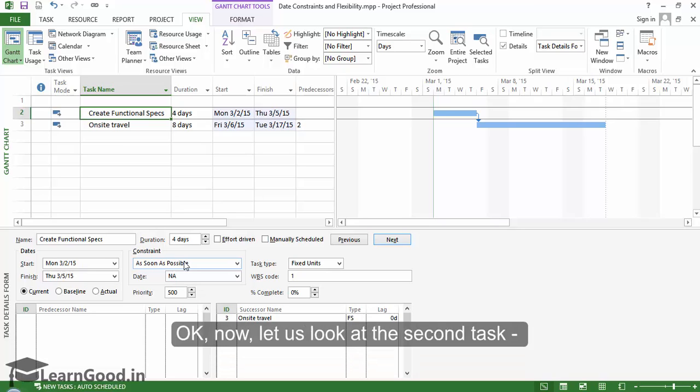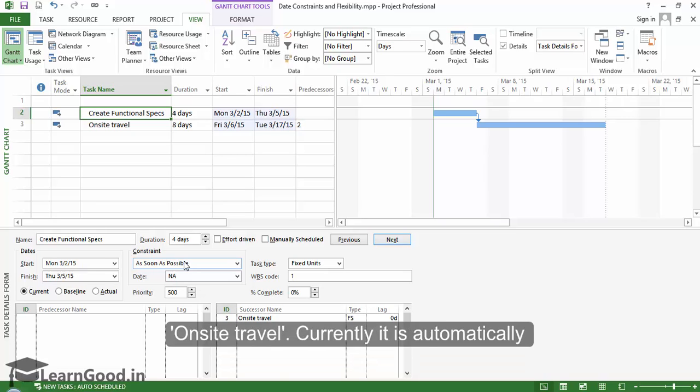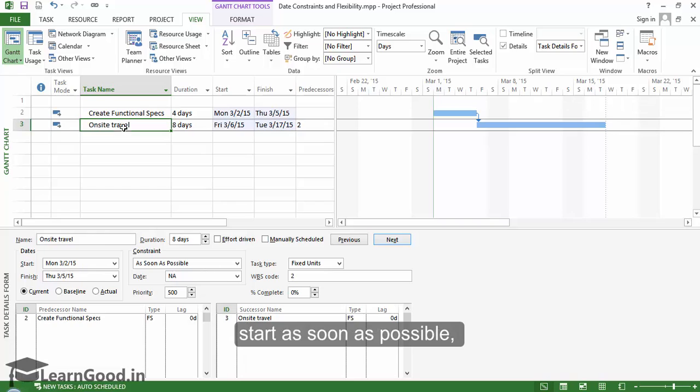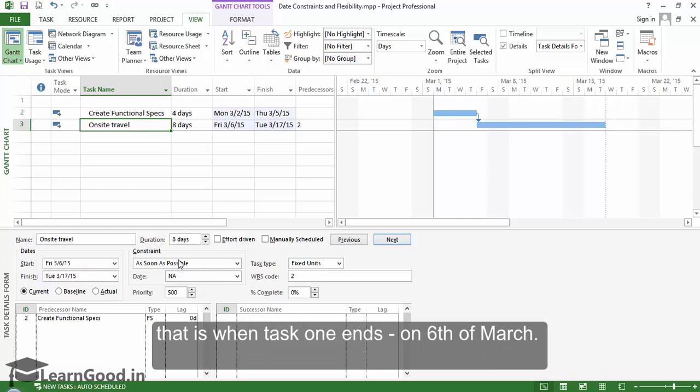Okay. Now let us look at the second task, On-Site Travel. Currently, it is automatically scheduled by Project to start as soon as possible, and that is when Task 1 ends on 6th of March.